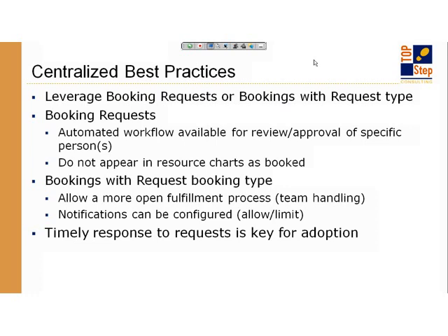Okay, the advantages of using a booking request are the fact that as you're asking for someone, they're not showing up as taken or pending or in the queue or anything like that as far as the schedule is concerned, because you've just simply asked the question. There's no data reflecting in the system that that person is or is not available yet.